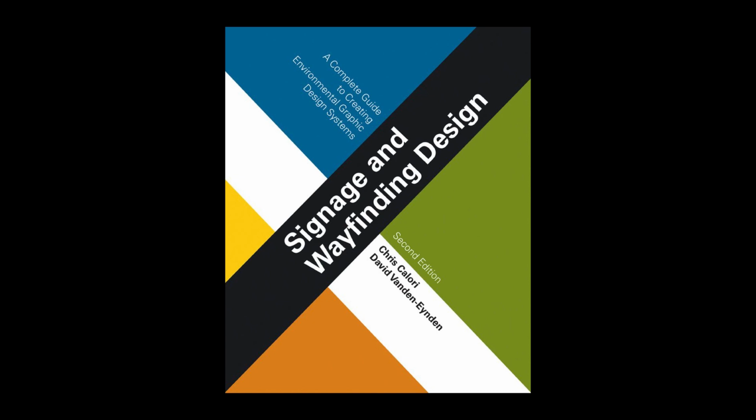Contract award recommendation. The contract award recommendation is typically a joint decision involving the contract rep, the client, and the designer. Depending on the project, factors other than price may play a role in the contract award decision. These factors can include the bidder's conformance with the formal contractual requirements, qualifications, understanding and responsiveness to the project at hand, financial status, as well as others.